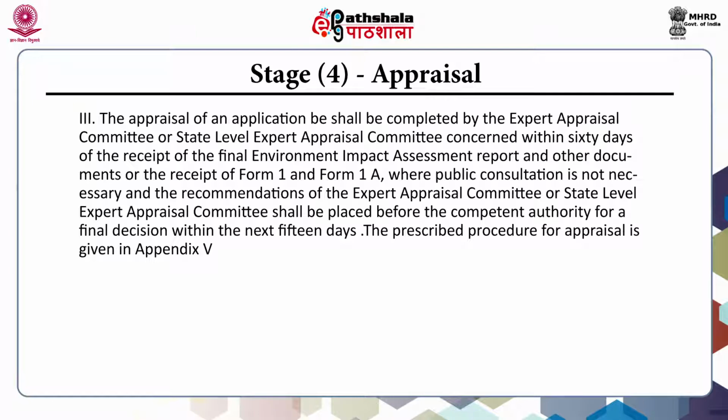The recommendations of the Expert Appraisal Committee or State Level Expert Appraisal Committee shall be placed before the competent authority for a final decision within the next 15 days. The prescribed procedure for appraisal is given in Appendix 5 of the said notification.